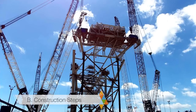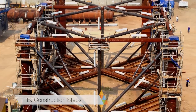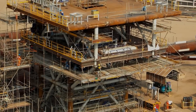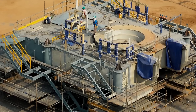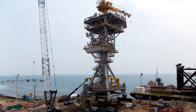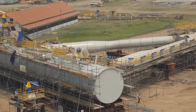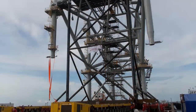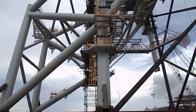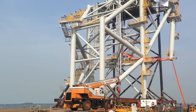Construction phase begins from the manufacturing processes that are carried out in the fabrication yard. The process is to build the structure of the mooring tower in four parts. The whole process of construction work is performed by domestic skilled workers. Then, the parts of the mooring tower completed in the fabrication yard will be shipped to Tuban offshore. This is the load-out process and shipment of the modules of the mooring tower that will be installed at site.